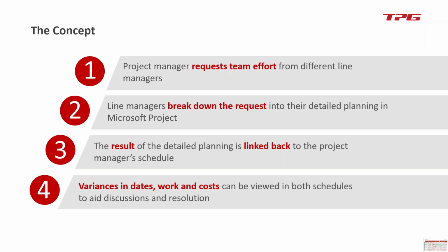high-level tasks. And the tasks will themselves become either projects or parent tasks in the projects of the team, and the team's view is going to be able to assess all the requests from all the different projects on a single point of view. They're going then to be able to detail the fine activities assigned to each individual and give back that view to each project manager requesting work for them, basically saying, yes, we can, or no, we can't respect the date that you're trying to reach in your plan, Mr.